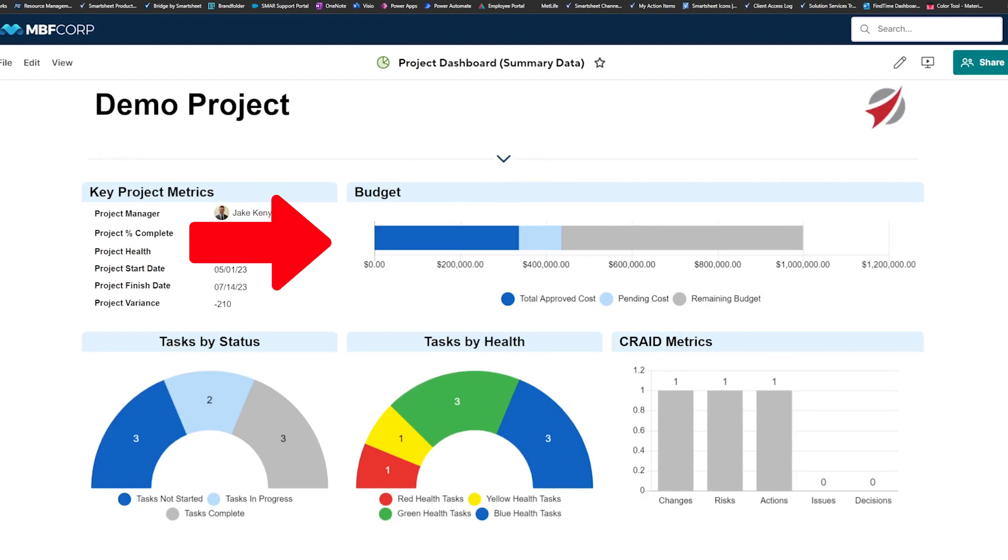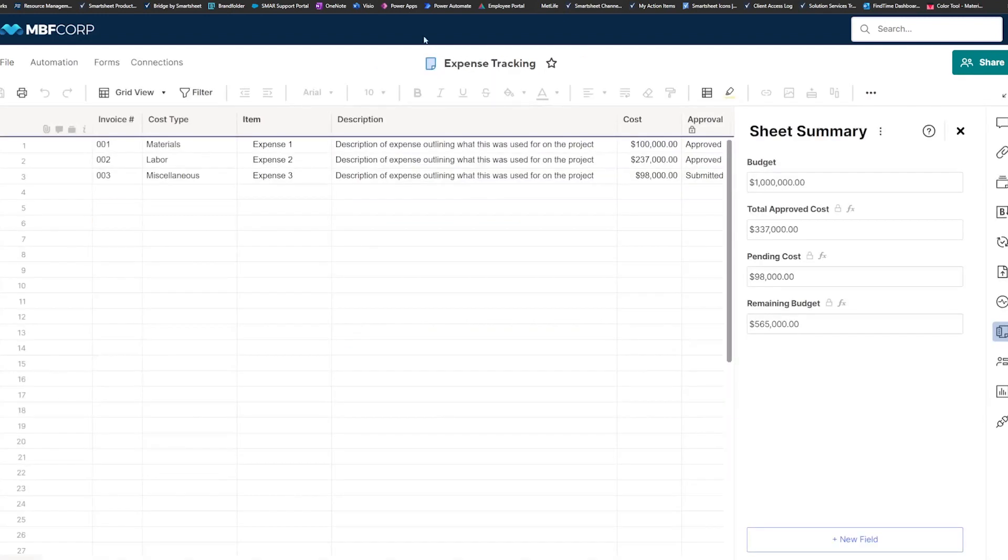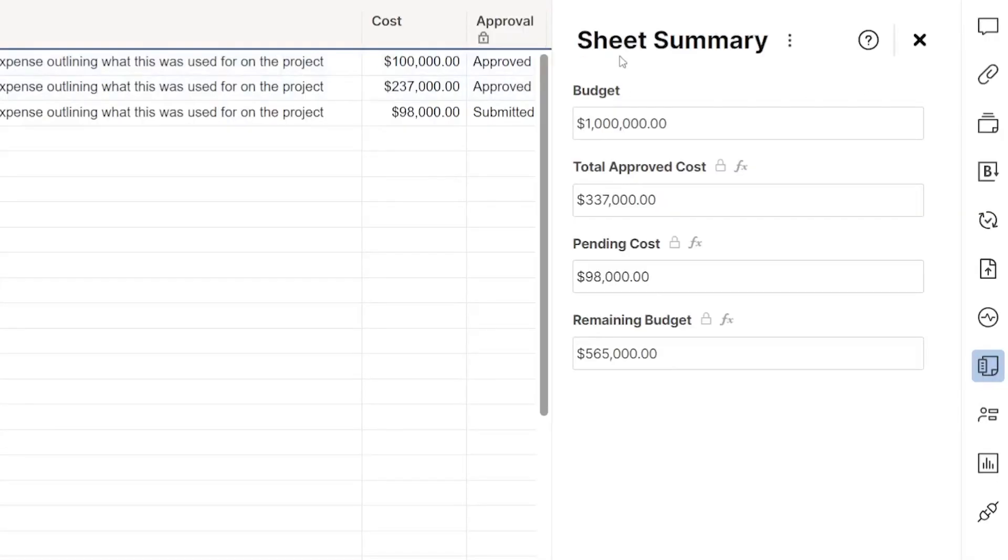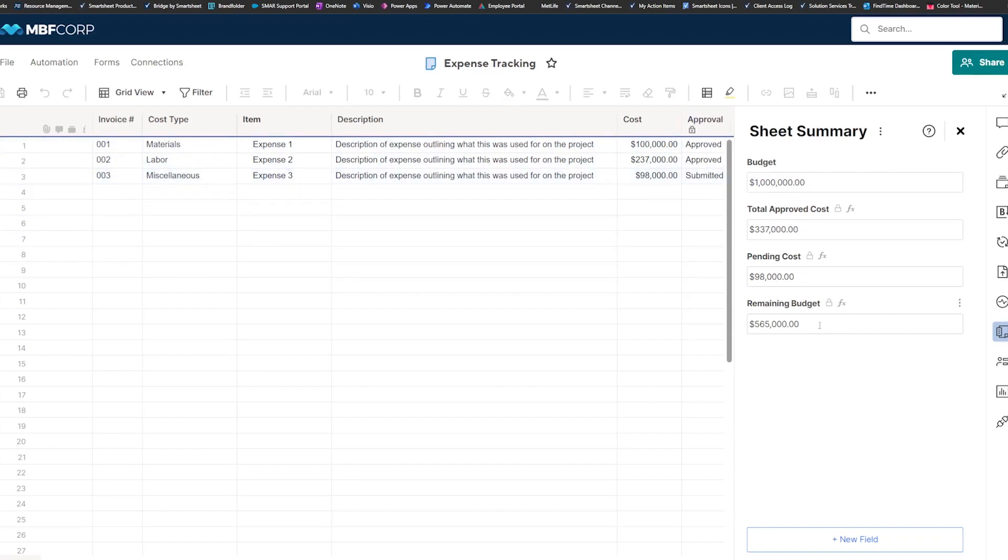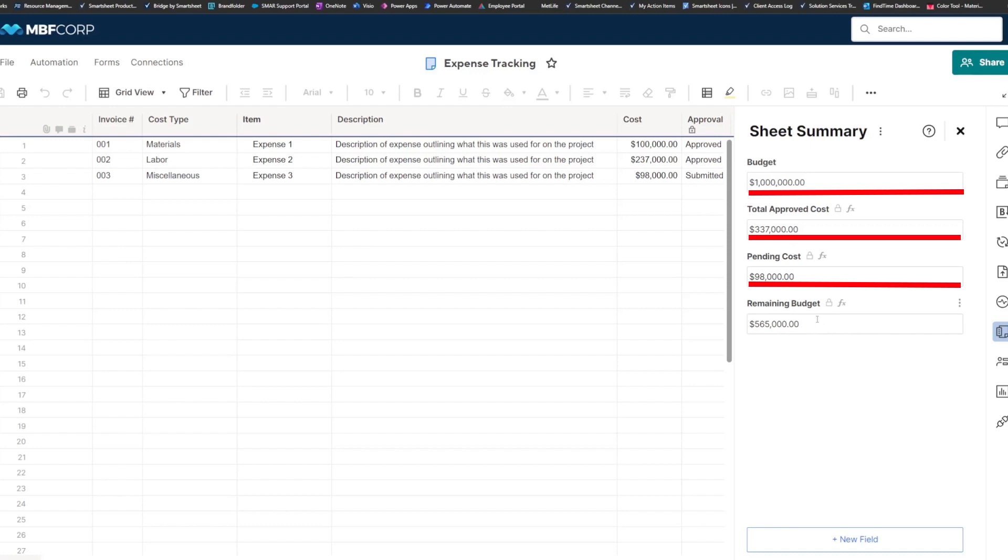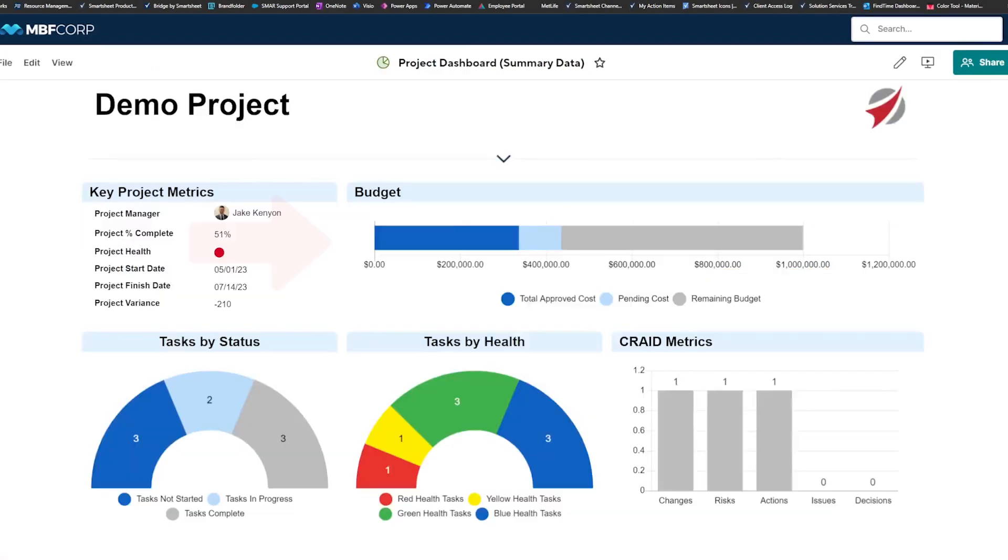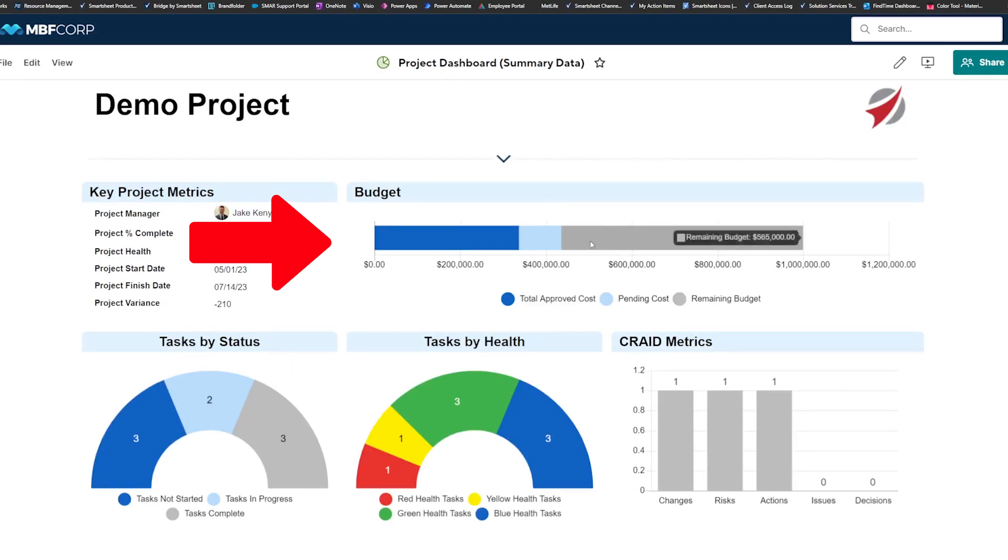These are just some other ideas of how you can use your sheet summary fields. So if we're looking at an expense tracker sheet calculated against a budget that's manually entered here, we're calculating our total approved cost based off this approval column, our pending cost based off of ones of these that have been submitted and not yet approved, and then the remaining based off of what's remaining between these two items combined and the budget, giving the amount that we have left to spend, basically. And you'll see that this is creating this graph for the budget on our dashboard.